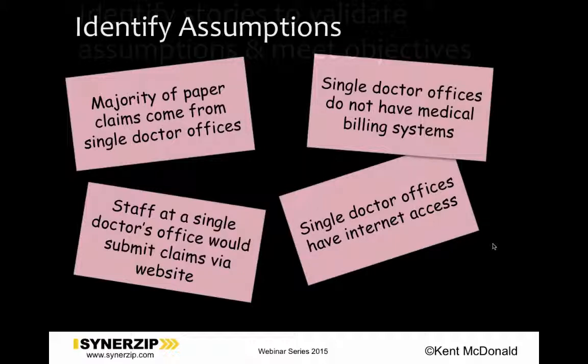These are fairly significant assumptions leading toward the solution we're going to pursue, and if we find out they're not true, it could really blow a hole in what we're trying to do. So identify these assumptions up front, because as you're starting an effort or a project, you're at the point of maximum ignorance. You know the least about it that you're ever going to know, because once you start building, researching, and talking to people, you're going to learn more. But when you're trying to plot things out and figure out what solution you might be going after, you know the least, and you need to make some assumptions in order to move forward.